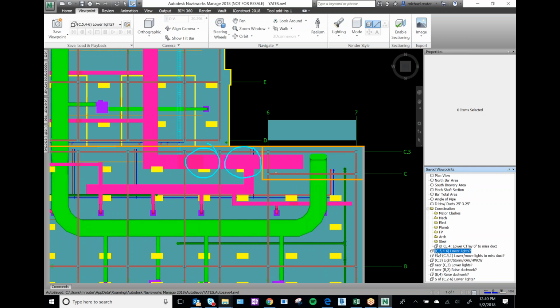I included a location on it. I marked it up, and I gave a description or a suggestion. All three of those things are pretty important, right? I made a suggestion. I'm not directing anybody to do anything.